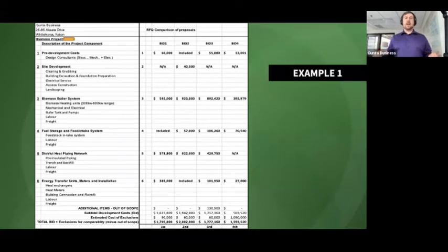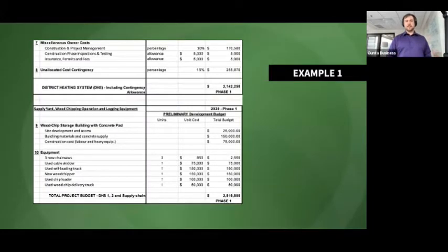And then you're able to move those costs back into the bid so that you have a total bid plus exclusions for comparability minus the out of scope. So that's the formula: the bid plus exclusions minus out of scope. And then when you do that, you get an actual comparable. And then you're able to make a value-based award. Of course, there are other metrics for success. This is purely price and completion of bid, which is important.